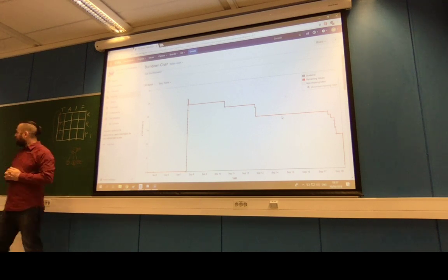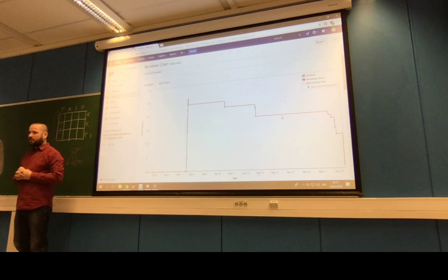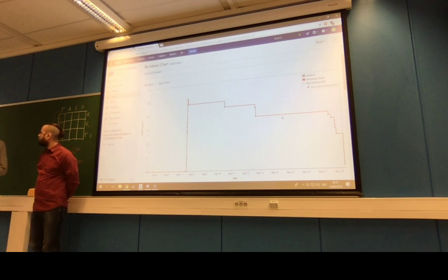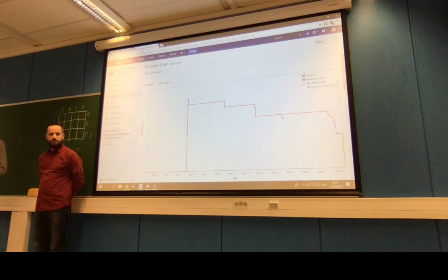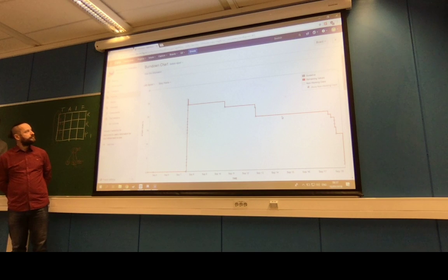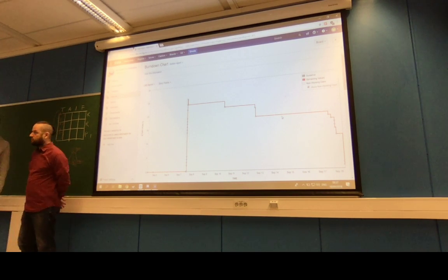Compared to initially, it was like maybe two long tasks or two big tasks that took actually the time. We're also seeing as we had two people who were going to focus on learning Android, we could just give them one big task for learning Android, for the duration points of the score. So you are including the learning as a task as well? Yeah. So far, we include everything that takes time. Okay, that's okay.